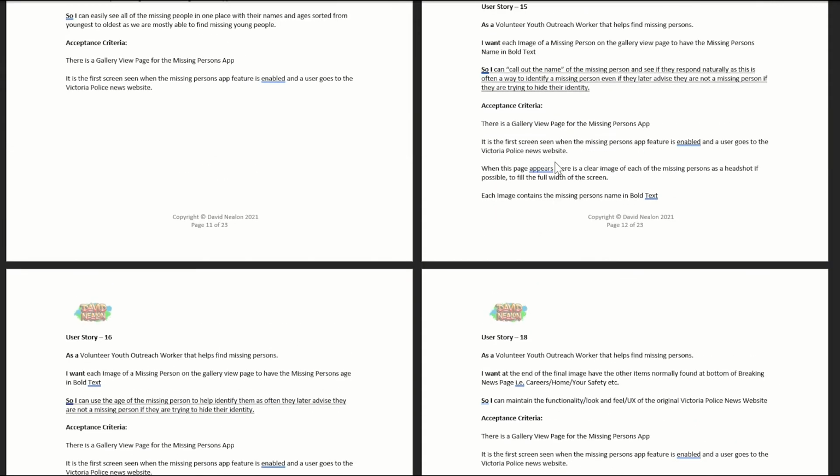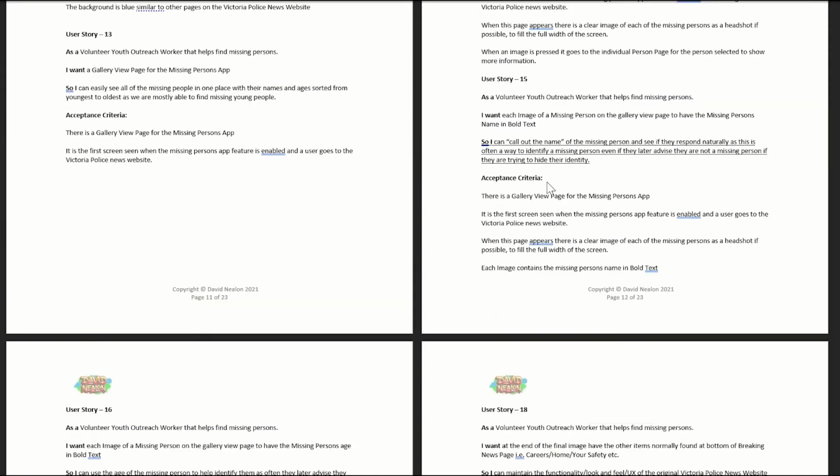So once you've done that, you then have the 4th part of each of the user stories, which is the acceptance criteria. And what that's used for is then when it goes off to the QA team to check that this feature works, this acceptance criteria they can use to set up their testing and say, right, well, this is what we want from this feature, and if it does this, well, then it's as good as we believe it's good as passed.